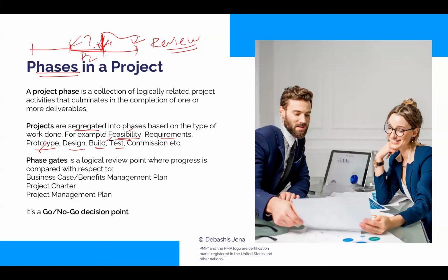We generally do. So that's why end of a phase is actually, again, a go, no go decision making point. Meaning, let's say, for example, after feasibility phase here, we find the product is not economically viable. We may drop the idea of proceeding with the project. There's no point. So I was telling you, this is what happens in a review. And generally, go ahead is given, as an outcome of the review to proceed to the next phase. And this review can be given many names.